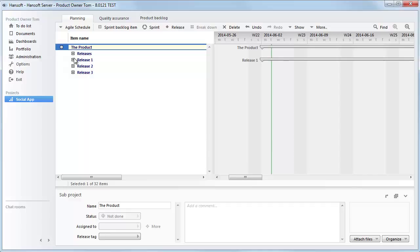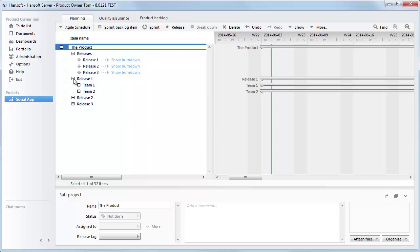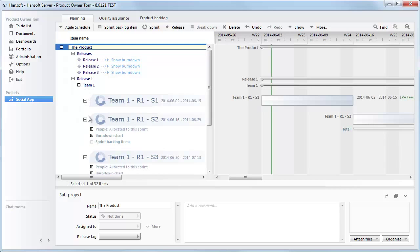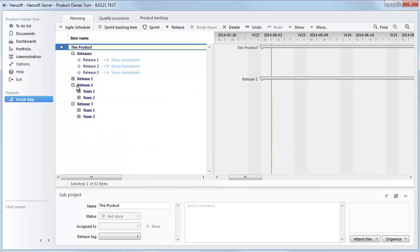Now, the question is, how do you think about it when building a deep hierarchy? I mean, there's several ways to go about it. We're looking at the schedule here, and you can see that I've chosen to structure it first on the top. I have the releases of this project, and then I've also structured each of the releases as one bucket. So you can see here we have release one, where each of the two teams have a bucket by themselves, where they have the sprints. So this is one way to go about it, to structure it by release.